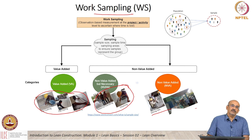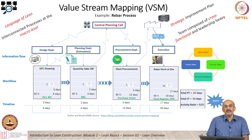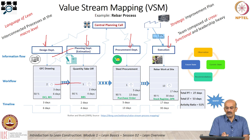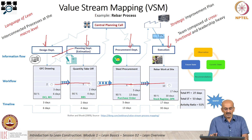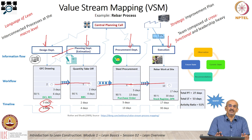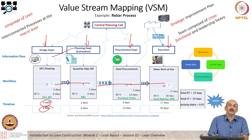Moving to value stream mapping — you can see an example of a value stream map here. This is a value stream map of a rebar process, where you have design, planning or estimation, procurement, and then execution, and how information flows between these sections and how actual work flows from drawing to quantity takeoff to procurement to rebar work at site. Once you map processes like this, you can record the actual time required for each step versus the total lead time versus value added time, and then look at the efficiency of the process, make changes, eliminate waste, and make the process more efficient.